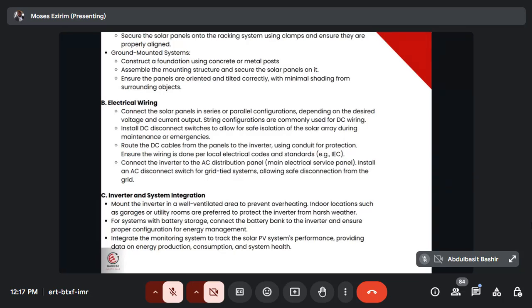I can have their coordinates. So once I have their coordinates, my installation becomes very easy. You understand? All I need to do is go to the site as a project manager. I will print everything out, get the civil guys, and give it to them. Once I give it to them, they already know this particular pile, this is where to stay. This particular pile, this is where to stay. Then my installation becomes very easy.